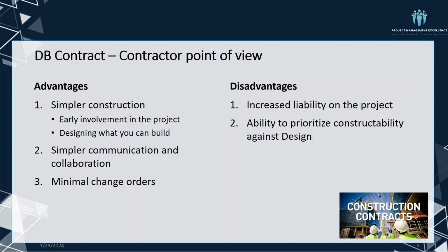Another disadvantage is that the client can be dissatisfied easily if the contractor just prioritizes constructability. I mean, designing the simplest and unsatisfactory looking project can be okay in the contractor's agreement with the client. This is the contractor's right to do, but can cause intangible losses.